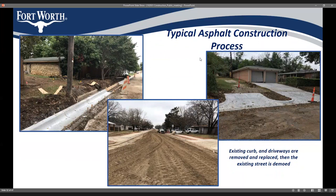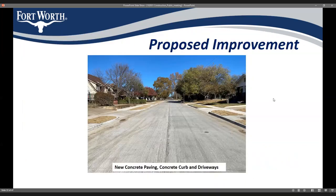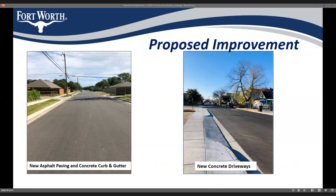For asphalt streets on this project, the existing curbs and driveways are first removed and replaced, then the existing pavement is removed in preparation for repaving. Here's an example of what a new concrete street looks like — you can see the integrated curbs and gutters, the concrete driveways, and the sidewalks on the side. And here's what new asphalt streets will look like: brand new pavement, concrete curbs and gutters, new driveways, new sidewalks.